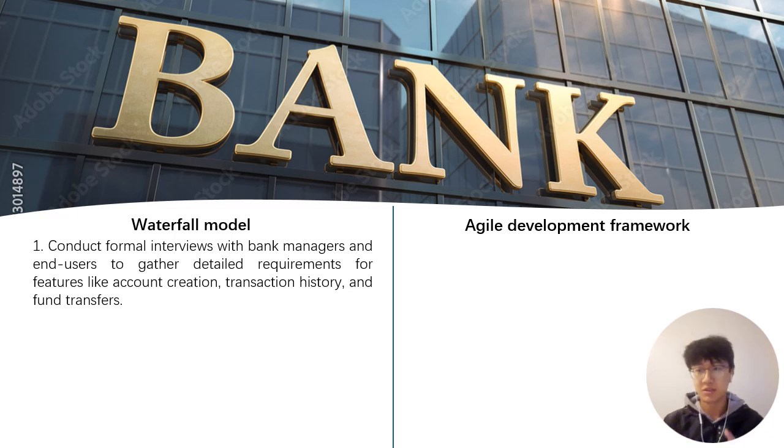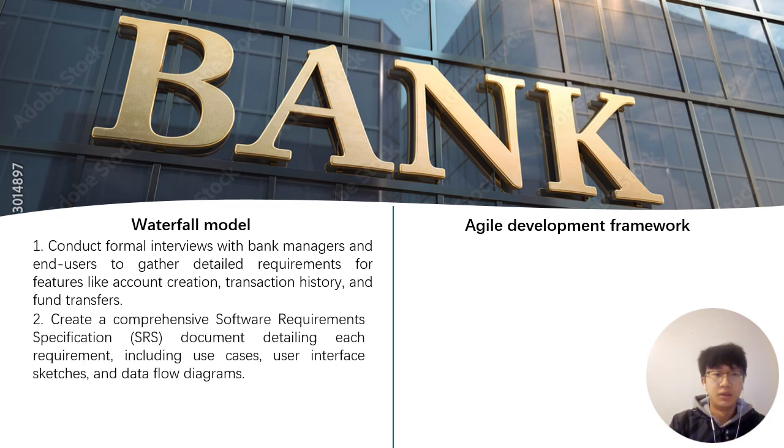What can we use? We can use questionnaires to hand to our clients, the bank managers and the end users, and collect their requirements. Then we need to create comprehensive software requirements specifications, also called SRS documents, detailing each requirement, including use cases, user interface sketches, and the data flow diagrams.